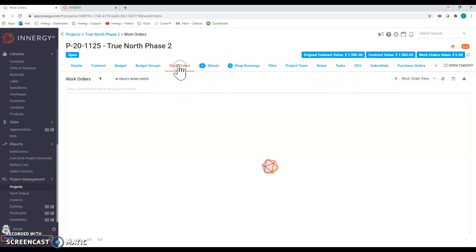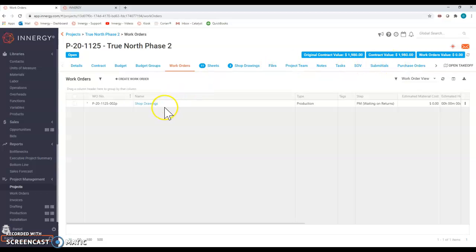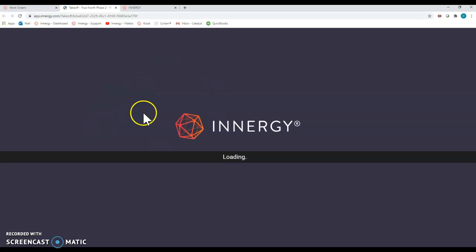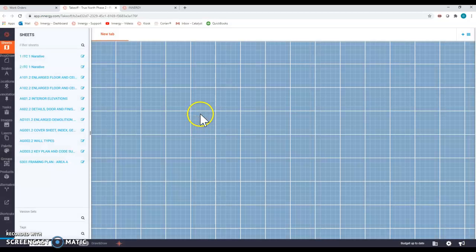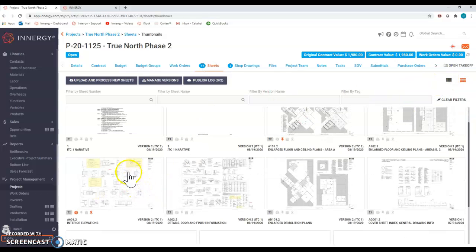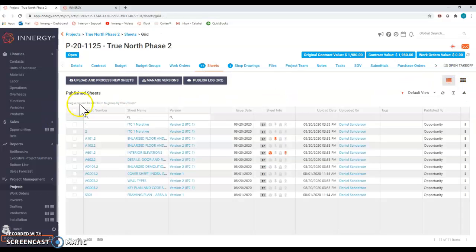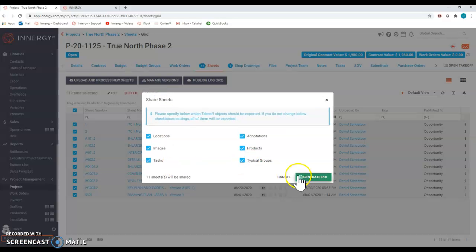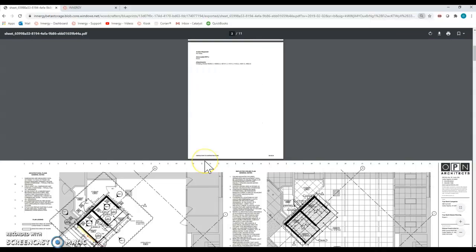The reason is that it's pretty important when the project manager is checking things like scope, and the engineer is looking against the scope to see what was bid. I don't necessarily want the engineers coming in here and messing around in the takeoff. I think that's a lot more than they need to deal with. So right now they go into sheets and generate locations, but it's not interactive and they don't get any information as far as what product was actually bid.